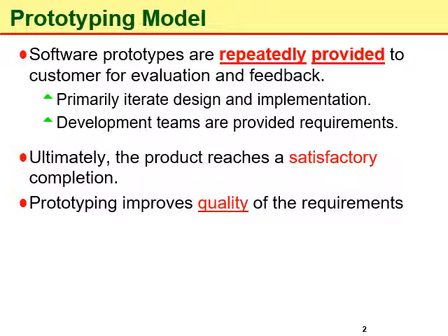end users' comments, the developers refine the prototype, adjust to the customer's feedback, improve the product or that specific prototype, and in fact add parts to the system on the way to presenting the next generation of the software for user evaluation. So this process is repeated until the prototyping goal is achieved or the software system is completed.